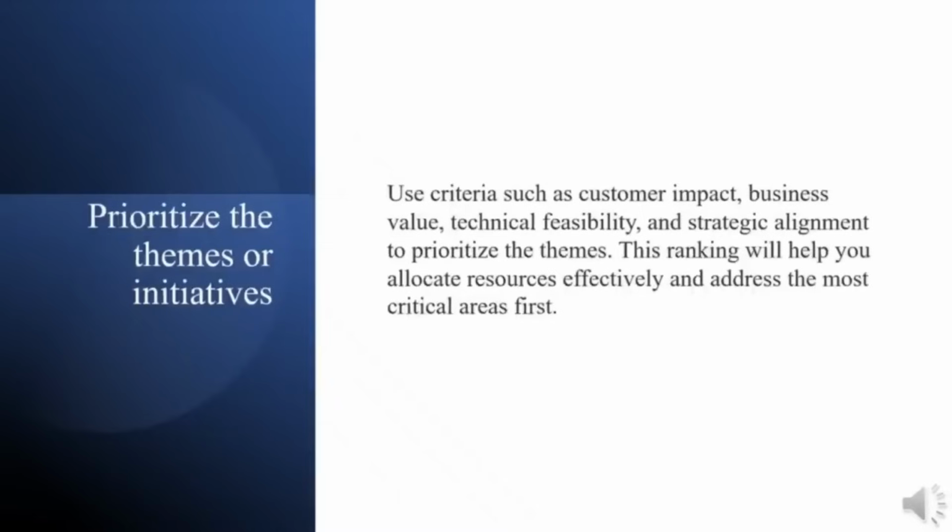Prioritize the themes or initiatives. Use criteria such as customer impact, business value, technical feasibility, and strategic alignment to prioritize the themes. This ranking will help you allocate resources effectively and address the most critical areas first.